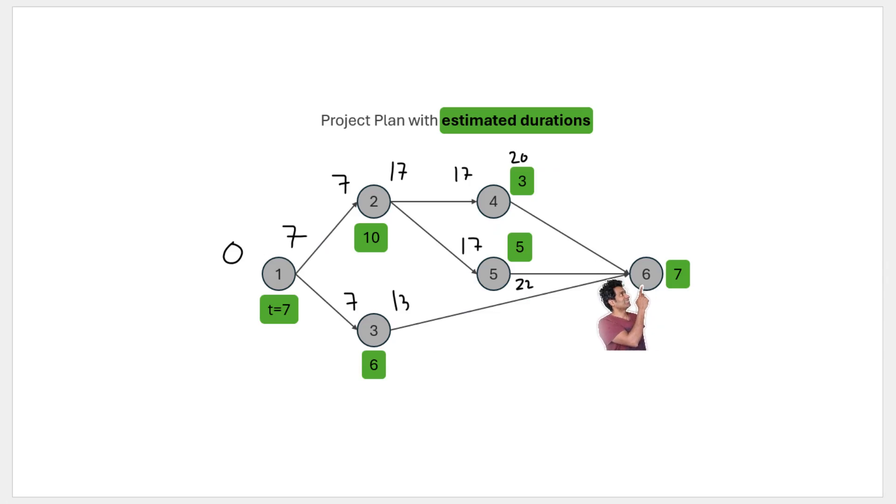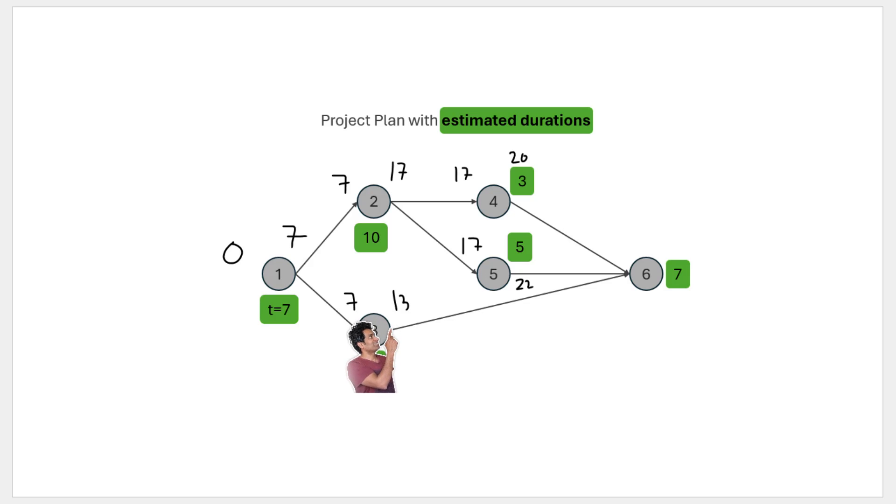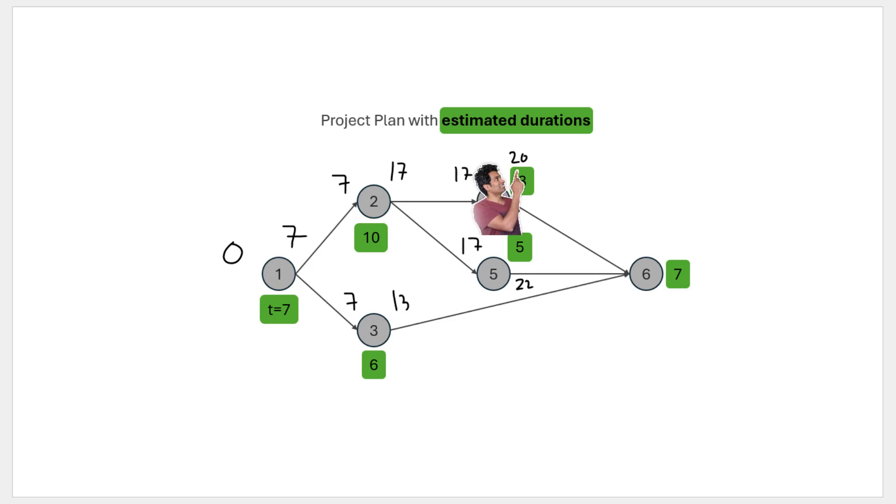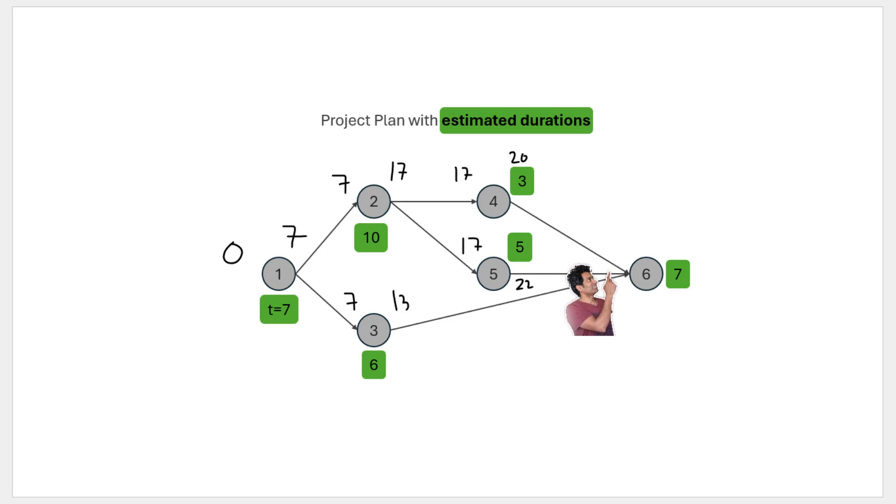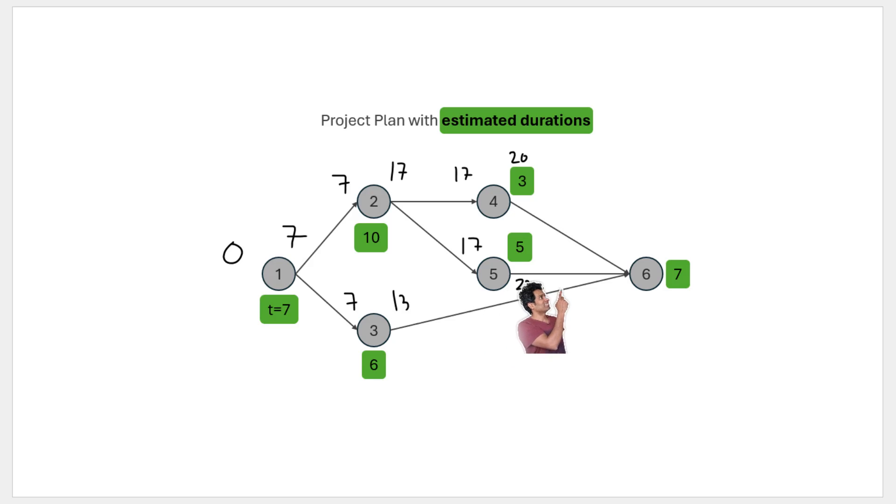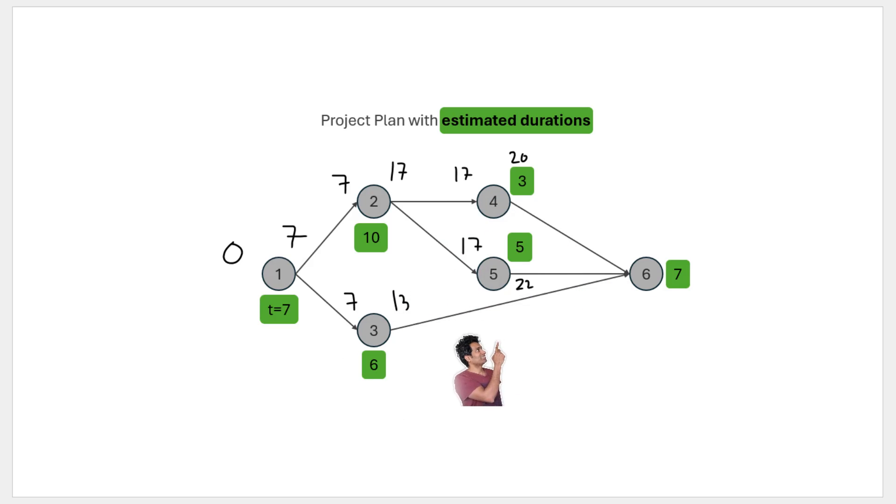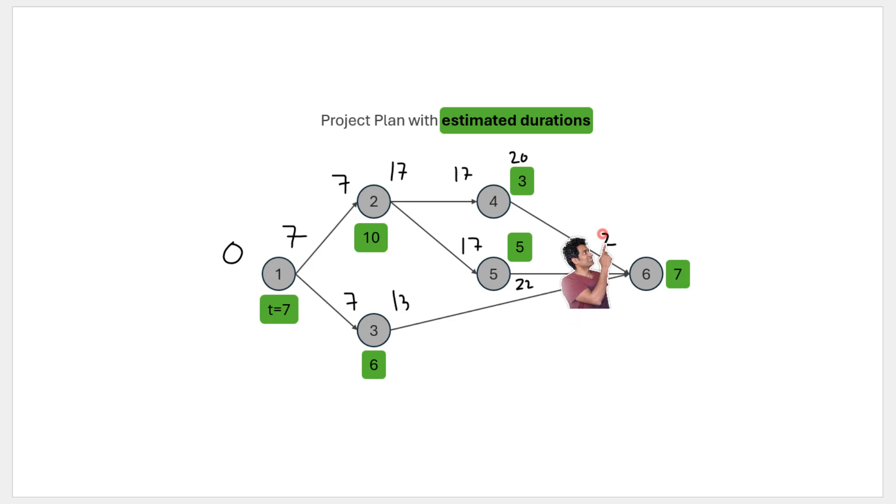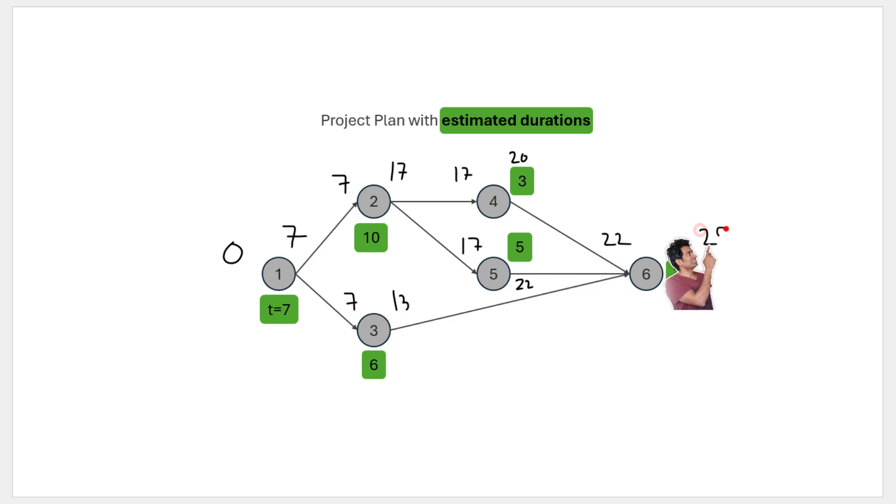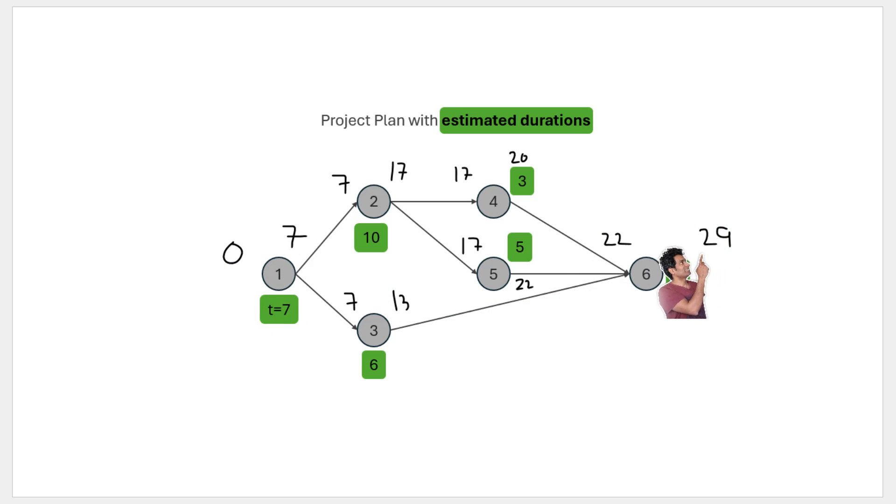We'll write these kind of numbers against all of these activities. Now comes the fun part. For activity six, we cannot start it until all of its predecessors do their job. So even though activity three is done by day 13 and activity four is done by day 20, we can't start activity six because we have to wait for activity five which will only be done on day 22. So the earliest an activity can begin is the maximum of all of its predecessors' earliest end times. So in this case, 22 will come here and it takes seven days to complete, so 29. For this little project of six activities, it's going to take 29 days to complete.